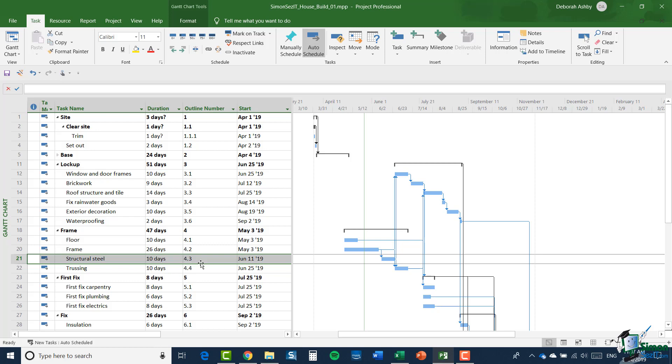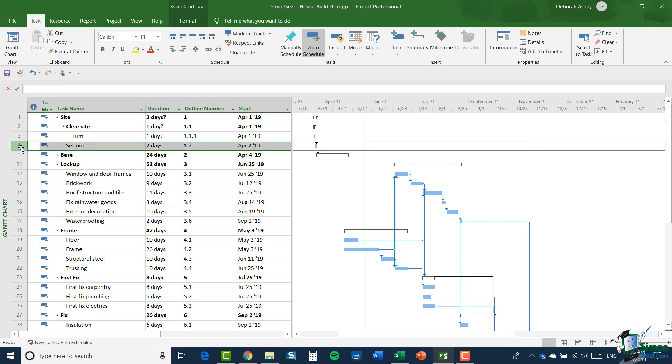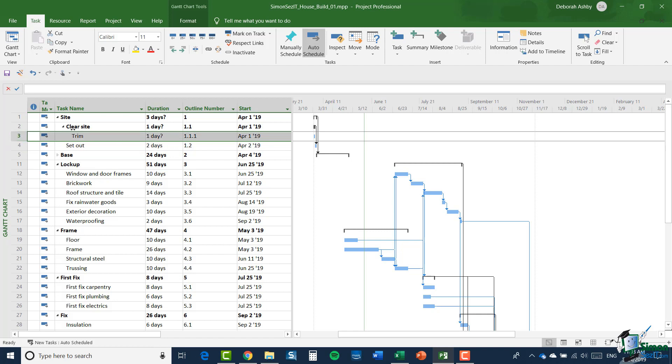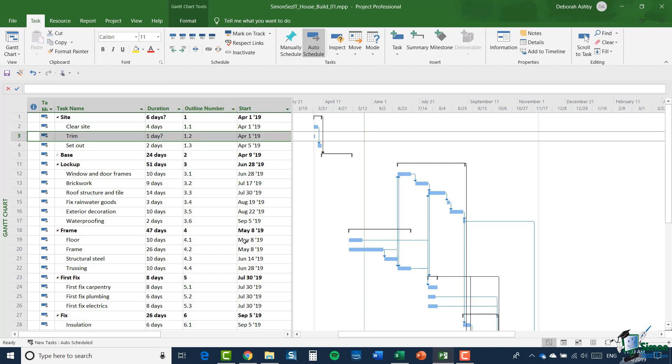Let me quickly show you the sort of problem you get with this approach. Now when I started, site had the outline number of 1 and clear site had the outline number of 1.1 and set out had the number of 1.2, and they still have those outline numbers. You can see that trim, because it is a subtask of clear site, it became 1.1.1. But supposing that trim had to go in but it wasn't a subtask of clear site, it was a subtask of site. So in other words, it wasn't indented to that third level. Let me outdent it again, and what happens is that the outline number for set out has changed.